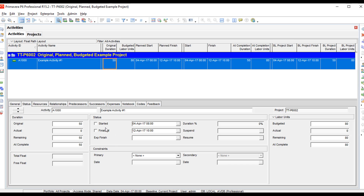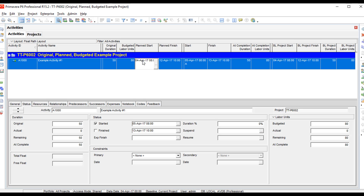If I start the activity as started again and change the current start to the 5th, notice how the baseline still reflects the 4th. However, if I come over to the planned start and change it to the 6th, the baseline changed to the 6th as well. So the baseline is feeding from the original duration, budgeted labor units, planned start, and planned finish.